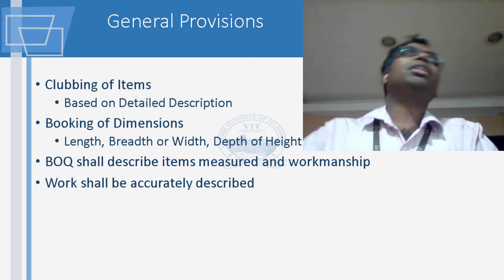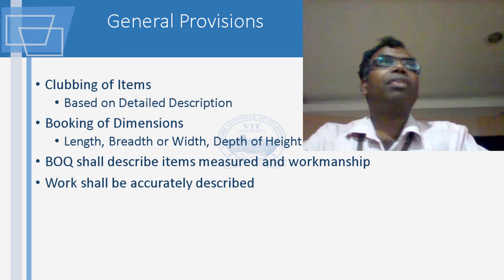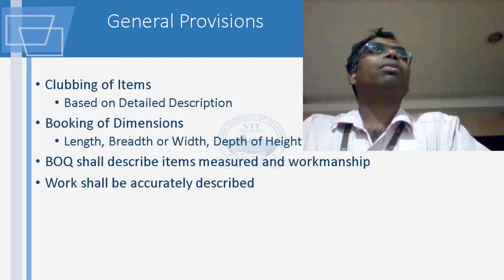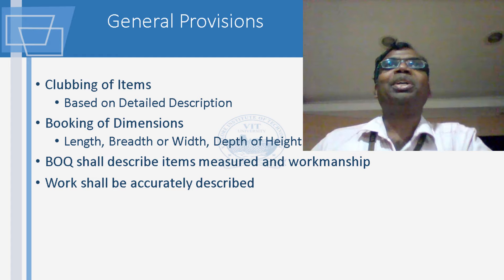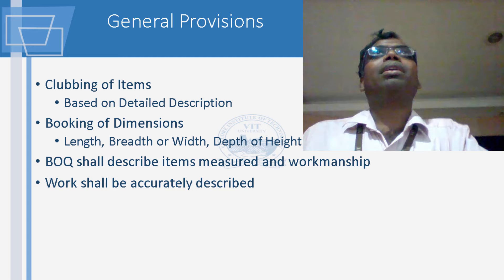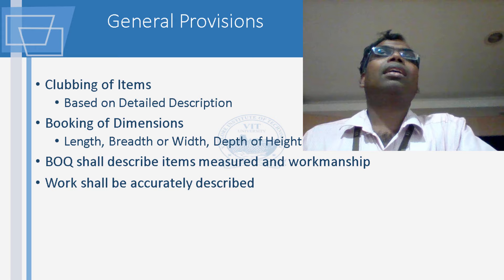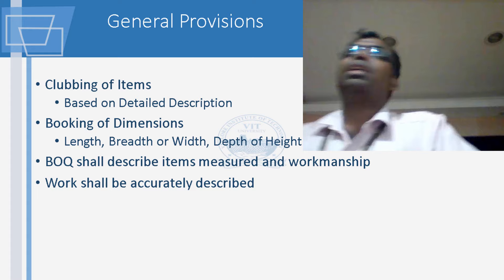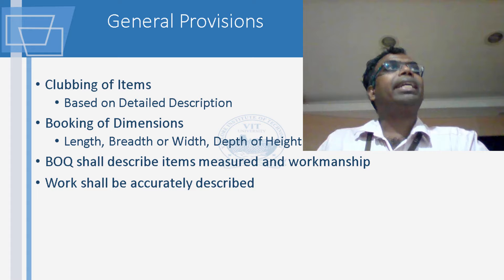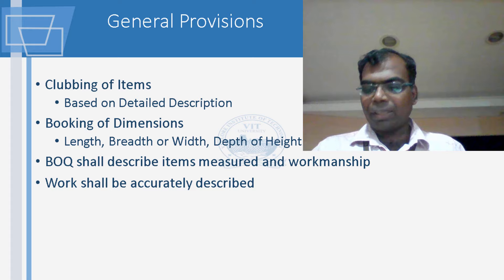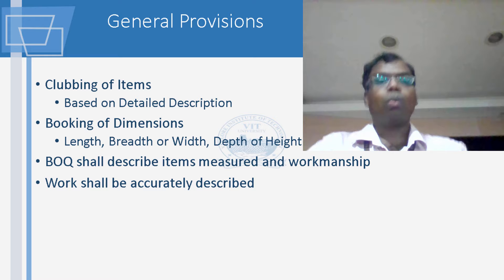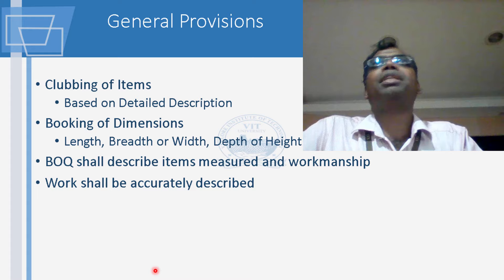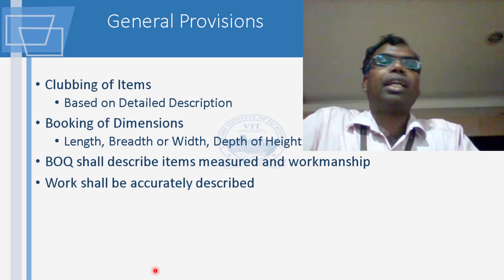These are the general provisions when looking at measurements. First and foremost, you club items of similar nature. When you have a measurement done, you give a bill of materials grouping similar works. For example: excavation is one group, PCC work under footing is another, then RCC work, and so on. RCC will be one major chapter, painting will be one major chapter. The dimensions are then booked — entering dimensions into your measurement book is called booking of dimensions. The order used is length, breadth, and height.